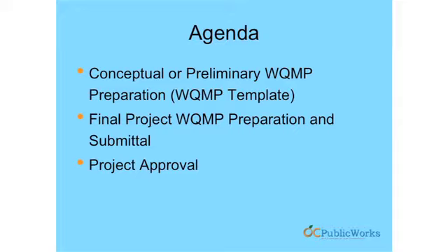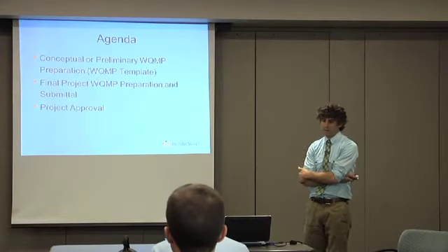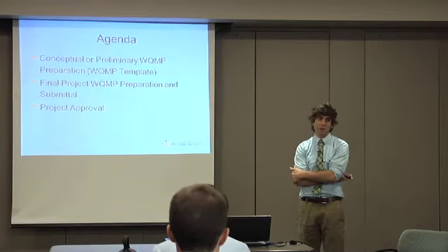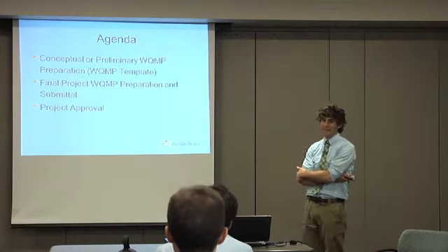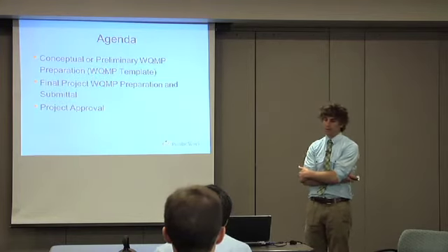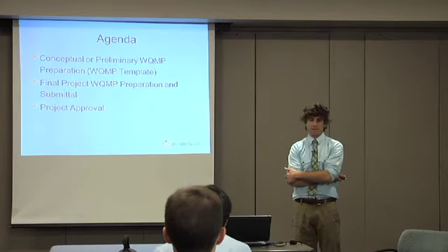And I want to clarify that anything you hear in here related to how you review conceptuals or finals and how you then orchestrate the things coming together for a project approval is really your process as an implementing agency, and not something that the county is going to define for you. There are certain things, of course, that the permit requires about approval. For example, the things on the WQMP actually need to be built, so how you assure that happens, and that they actually need to be maintained, so how you assure that happens. But the specific mechanism by which you make that happen is not necessarily specified in the permit.